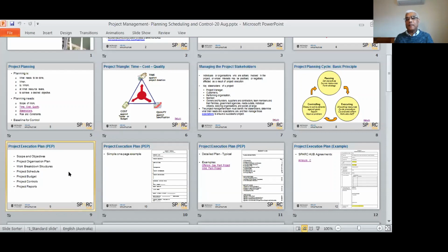Whereas if you want to do integrated schedule and cost control using an earned value management system, it should be a single combined effort. The task in the schedule should be priced and costed. Then you can feed one set of data into a system where you can calculate the schedule variance and the cost variance.